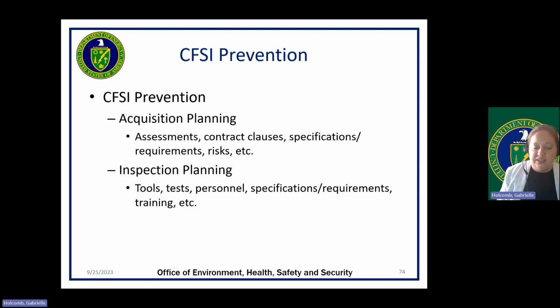The integrity of systems and information is a critical component of managing supply chain and cybersecurity risks. Prior to procurement, processes such as project planning or design processes should consider the bill of materials, how items will be used, criticality of items, and their associated risks, tests that may be needed, and customer defined specifications. It is vital at the procurement step that requirements are well understood and communicated to suppliers, and that contracts properly document requirements. This is especially true when procuring items that will be used in a more critical capacity.